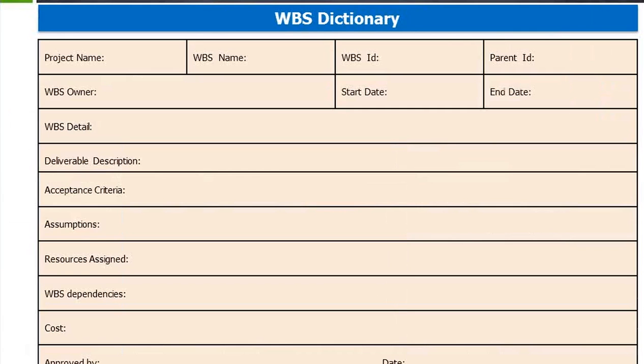Every WBS has to be accompanied by a WBS dictionary. The dictionary gives the textual details and explanations of each element in the WBS, which will help anyone looking at it understand the meaning and content.